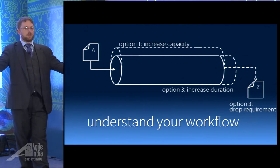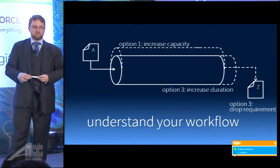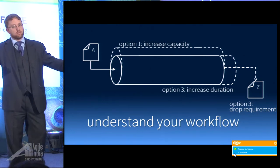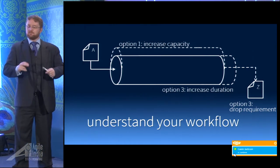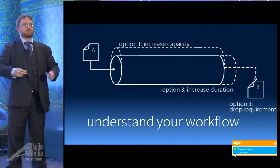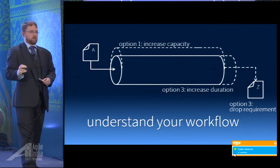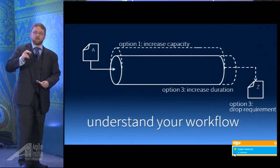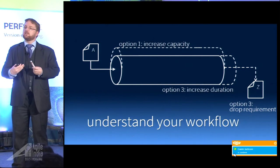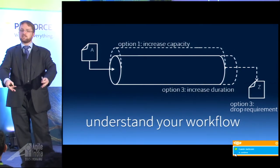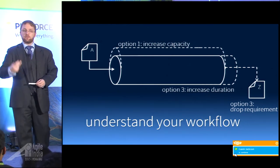Second option: increase duration. If I have a ten-week project and I add a week's worth of work, I could add more staff to do it in the same time, or do it longer. Or drop a requirement. In an Agile perspective, especially where you have a fixed contract, start to think of it as an exchange request. Where you do have fixed scope or fixed time and you're unable to negotiate, you need this exchange request: I will take something out in replacement for what you're putting in. You can build those concepts into your contracts.